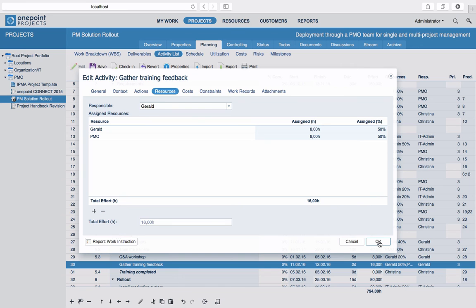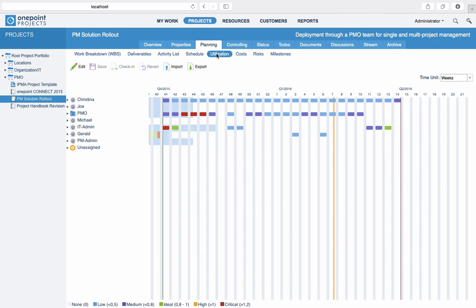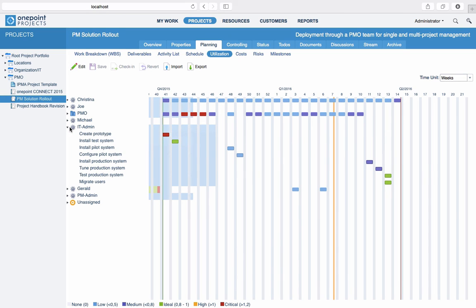Sometimes you do not know if the resources you are working with are also assigned to other projects in parallel. The Utilization Planning view provides you with a quite unique visualization to help you tackle this problem. On the left, you see your project team on the first level and all currently assigned activities per resource on the second level. On the right, you see the background utilization originating from all other projects as shaded bars and the total utilization including this project in the form of solid bars.